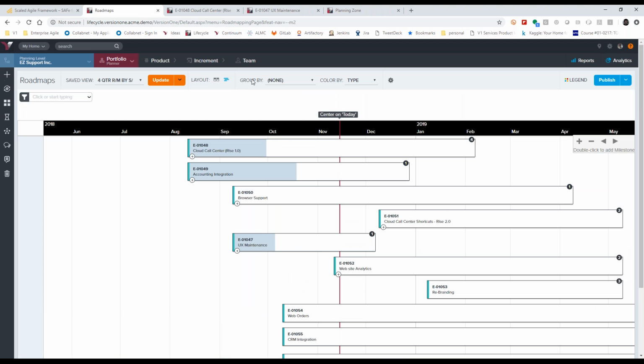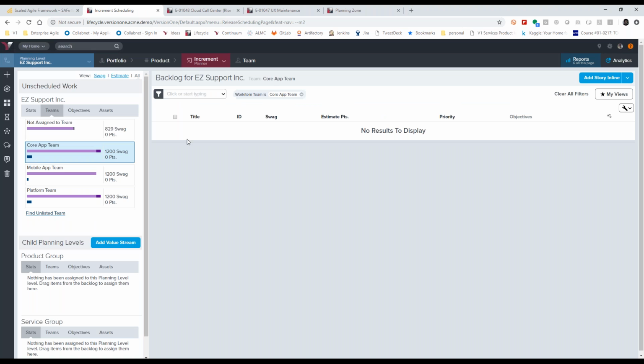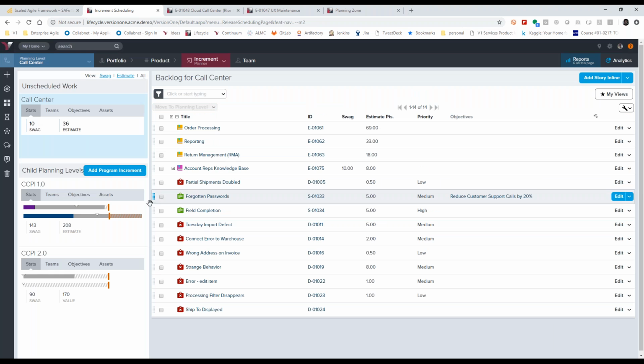For your particular question, you're asking about team capacity and allocation around that. That is a function of the program, and what we can do there is set targets for the teams that are going to execute. In the program increments, we set targets for the organization to plan to, in this case 150 points. And we've allocated 143.